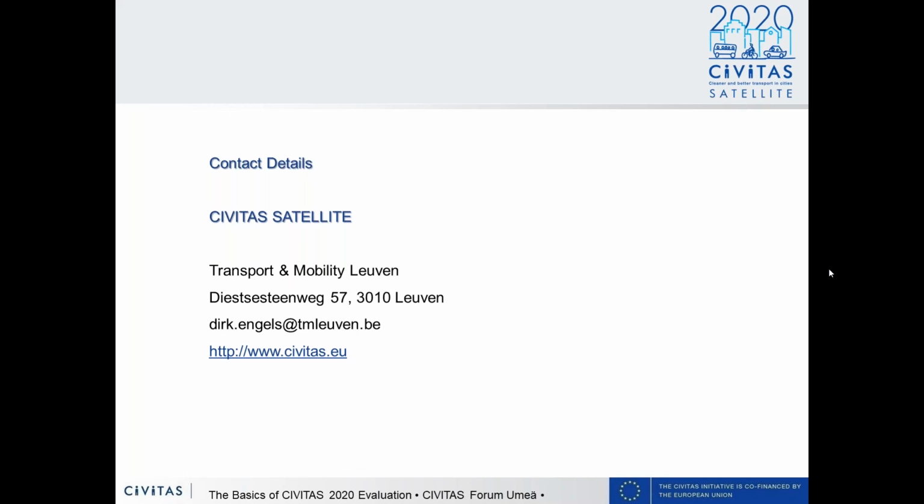For some of the measures, the impact will go on for 2 years after the project, and we can't measure that, so we have to make choices. In many cases, I think 6 months is a good starting point when we consider how long it takes to have an impact.